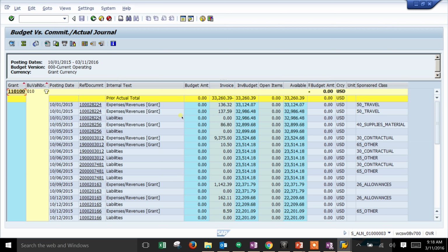that what this report is displaying is the released and posted budgets compared with commitments and actuals, all based on a line item basis, and for a period-based encumbrance actual tracking. So very simple report, get good data from it. It's exportable to Excel and to other doc types, so you can put it into an XLS without much manipulation. That's our first report.